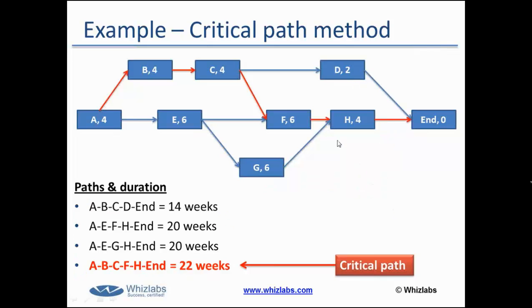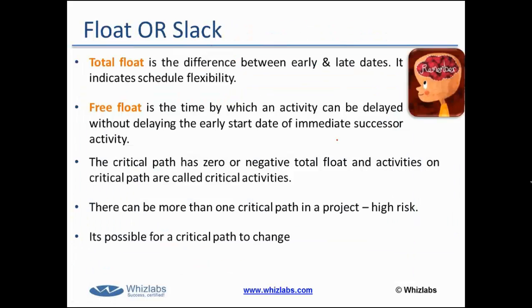Now let's look at another concept, float, which is involved in this particular concept that I need to describe. If I go back a few slides, this is the definition of float. Total float is the difference between early and late dates. It indicates the schedule flexibility, and free float is the time by which an activity can be delayed without delaying the early start date of an immediate successor activity.